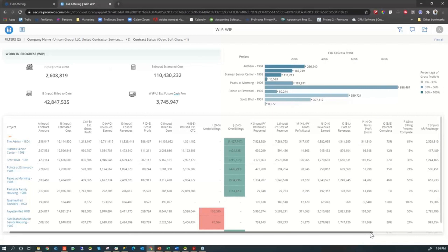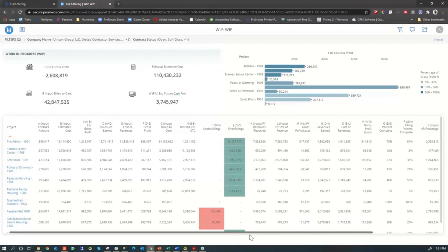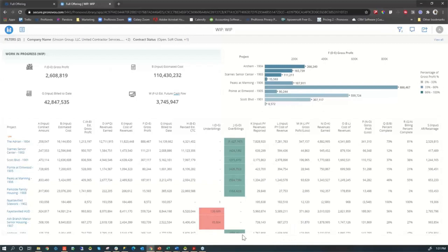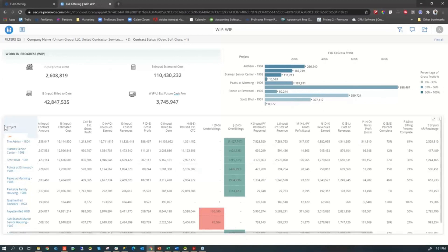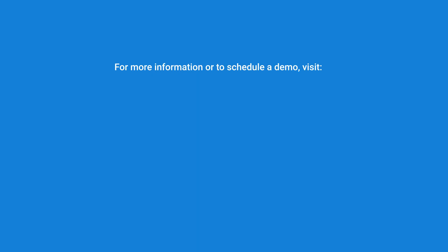Retention and so forth. That's a good report and it does give us the ability to, on a monthly basis, have each project manager do a cost of completion for each job.